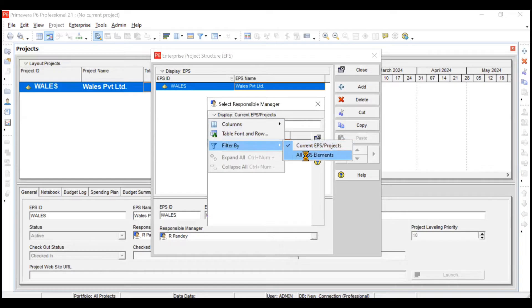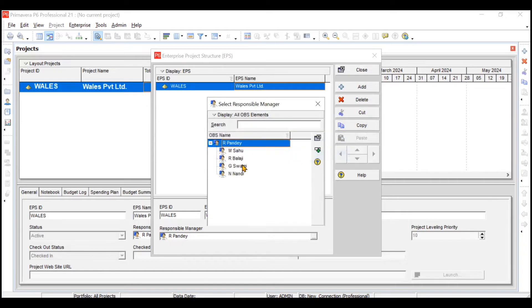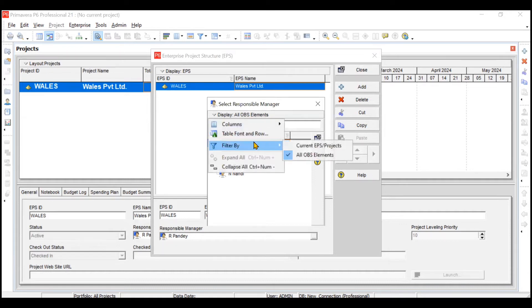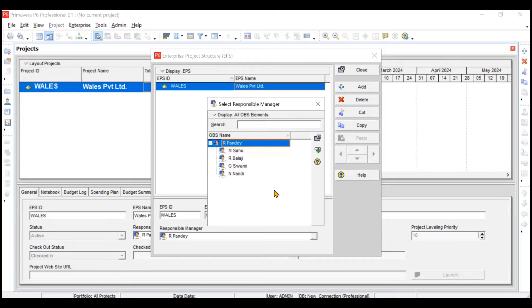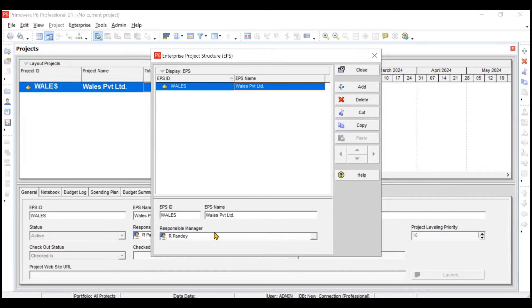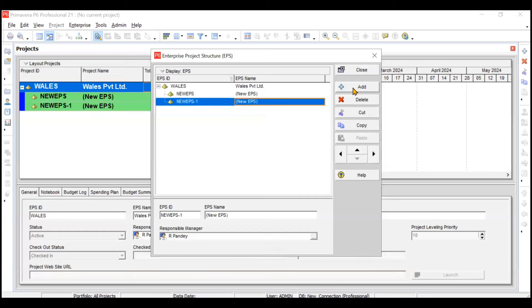To assign the manager, filter by all OBS elements — instead of current EPS projects, choose all OBS elements. By default it shows R. Pande, and from the presentation we know R. Pande is the Managing Director for Wales Private Limited, so the Wales Private Limited EPS will be assigned to R. Pande. Under Wales Private Limited we will now create four further sub-EPS.